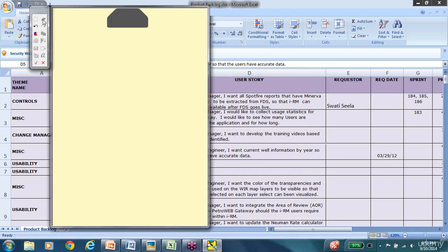So that's the thing. Coming back to the testing. Now there are two ways testing happens in sprints. One is not so ideal, the first method, the method that I used to follow in my team. It is not optimal. So that method, we will start with the first one. So let's say if the sprint is 2 weeks long. So the first day is sprint planning. Day 2, the developer and the business analyst will sit together. They come up with a plan, and they come up with an FRD or a use case, and they come up with a technical implementation. Day 3, they'll start to code, let's say. It will take day 3 and day 4 to code, and day 5 to unit test and integration test and all that.